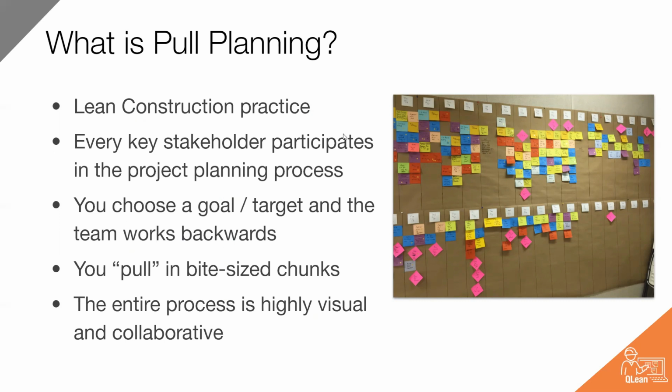But you're really choosing a goal or a target, and you work backwards. It's a way to create a critical path, the long pole in the tent, as they say. Figure out who needs what, and you work backwards in that process to come up with a schedule.